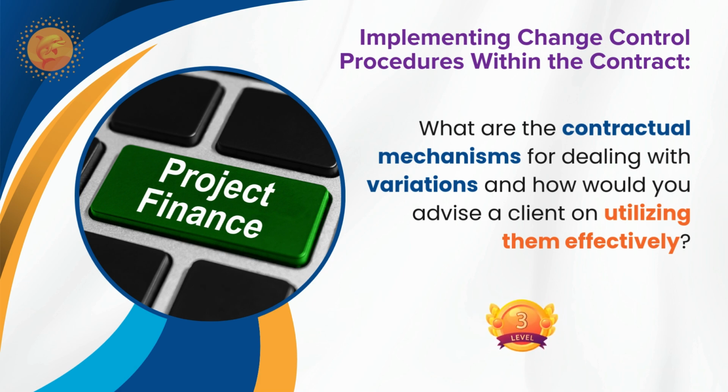So the timelines and all, you have to make in project protocols, within how many days, because otherwise how will you manage? So you have to make a set of project protocols for everything, like mutual approvals, issuing of the drawings, everything. Otherwise, that is mutual understanding between the engineer and the contractor. But again, this is the contract administrator's job to make sure that this is agreed between parties at the initial stage itself. Otherwise, later nobody will agree. So whatever you want to do, you have to set up these things. That's why it is called procedures.